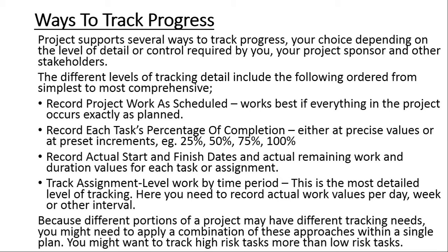Then Project will calculate the percentages. Lastly, we can track assignment level work by time period. This is the most detailed level of tracking, where you need to record the actual work values per day, per week, or any other interval.